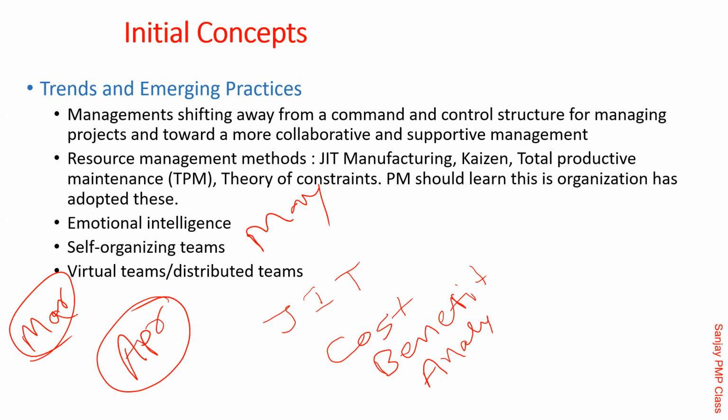Now, Kiran, obviously, the moment you buy it, you will have to make an arrangement. For example, if it is cement, you will need a storage arrangement for that. Cement cannot be kept in the open. So for all that, do a cost benefit analysis. If you believe that it is useful, please go ahead.